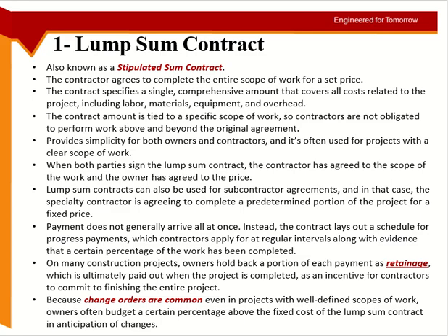They get it from here, and sometimes they are holding other suppliers: when I get the money, I will pay you. So a one-time payment at the end of the project will be very difficult for them. They cannot manage it, they will be broke, and the project will not complete for sure.